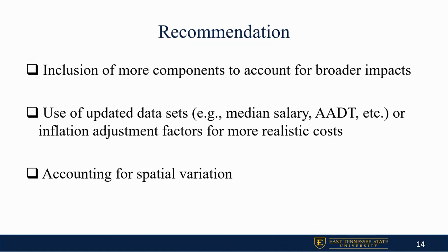Secondly, we recommend the use of updated data sets for each component, as some of the data sets for different components are updated annually or periodically by most of the prominent organizations. And this act of updating will help to derive more consistent and accurate road users cost values. The third recommendation is to develop the road users cost methodology with variation based on the location of the work zone.